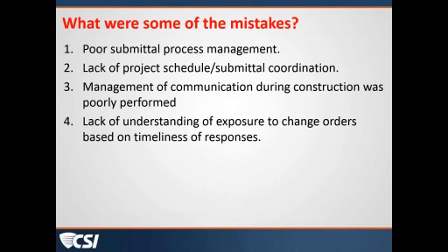But then you also have the issue of if the waterproofing is the wrong product. What if you really wanted a sheet waterproofing and he's putting on a fluid applied damp proofing material? Then you've got the issue of if something is not done immediately and he's continuing on with the work, you've got the issue of all of the work that's being done and the change order that's going to come saying, well, you knew what I was doing. You were out there on this day. It's in your field report, and you said nothing about it. So all those issues need to be taken into consideration.